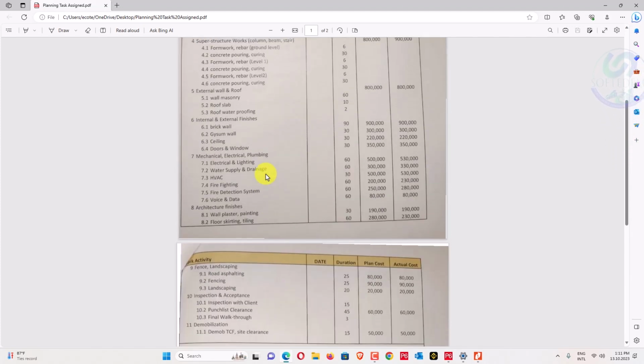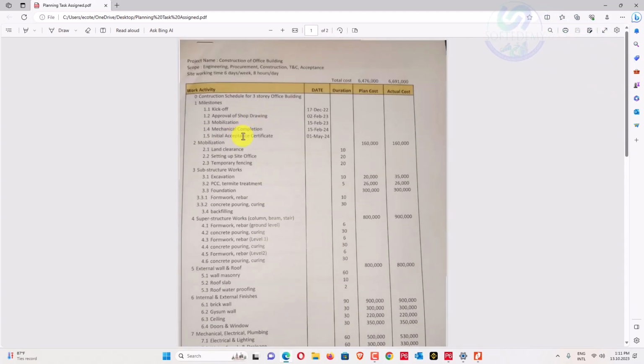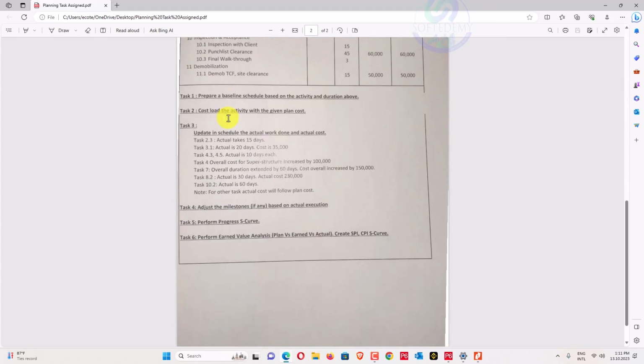Maybe you can call them control milestones if these are required. But these are the basic milestones which have been already given. If any are required, you can also assign them. So we'll consider that task as an optional task, but I will do it and show you some examples so you can do that if somebody says to assign some control milestones. Control milestones are those in which we monitor our project at different intervals, and we want to monitor our KPIs and performance indexes at a certain position, at a certain month.